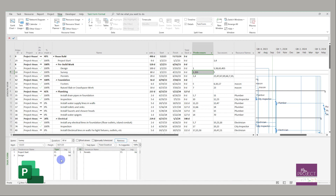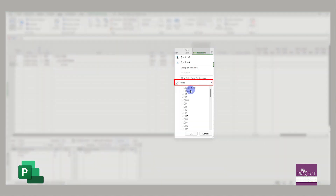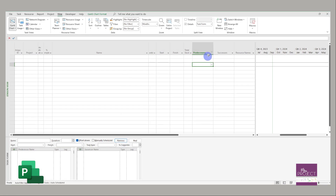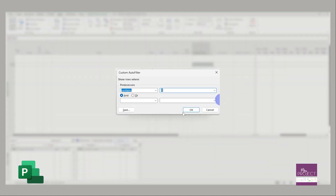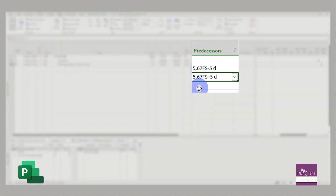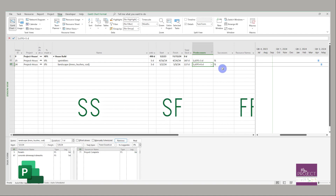When changing relationship types, you can do it in the details view, but the easiest way to check is filtering on your predecessor and successor columns using 'contains.' Filter on SS to find start-to-start relationships — it appears next to the task number. Filter on SF for start-to-finish, or FF for finish-to-finish. The finish-to-start relationship typically shows no suffix unless there's a lag, since it's the default.